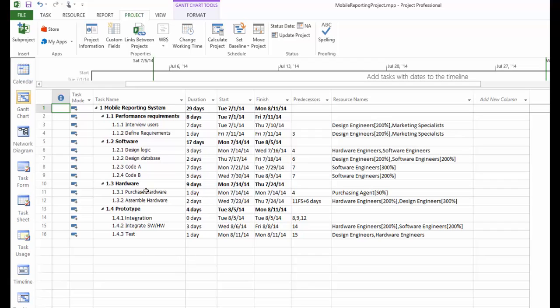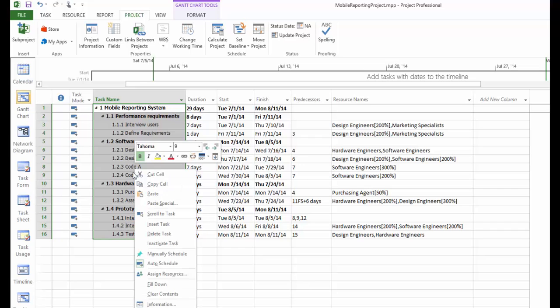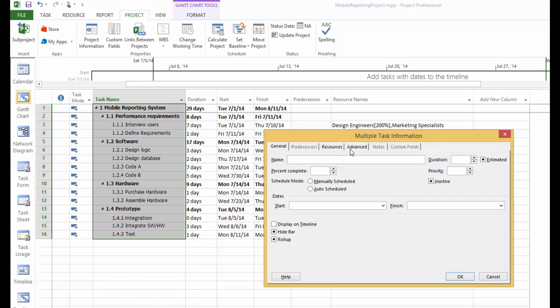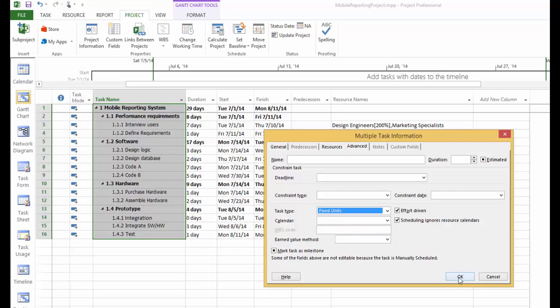For this purpose, you can select all tasks in the task name column, right click and go to information, advanced tab. And for task type, we're going to change it to fix unit and click OK.